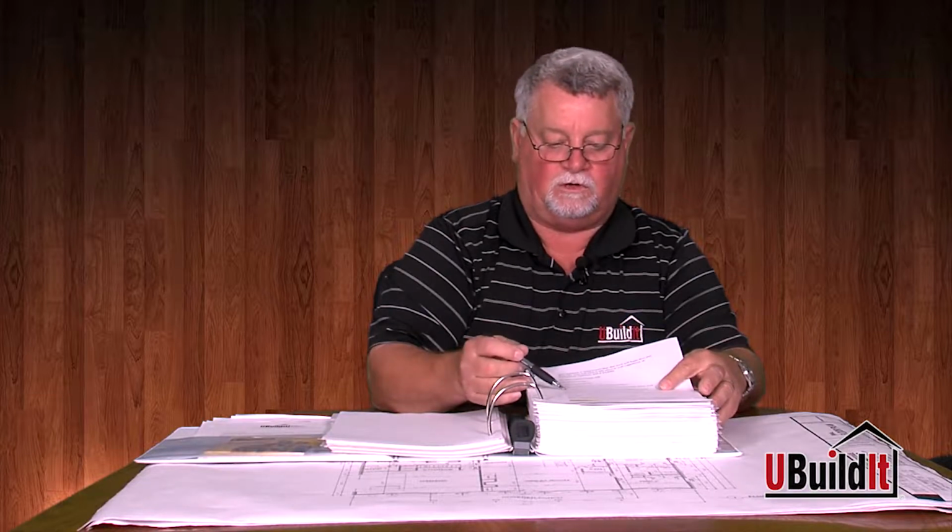After that, we're going to contact the framer to notify him of progress. We're letting him know our ground plumbing's in, we're waiting on an inspection, and the rest of the forms need to be set up for the slab. So we're probably within a week and a half, 2 weeks max, and we're ready for that framer. There should be no reason why that framer should not have us on his schedule now, and we should not have to wait when our project gets ready for him.